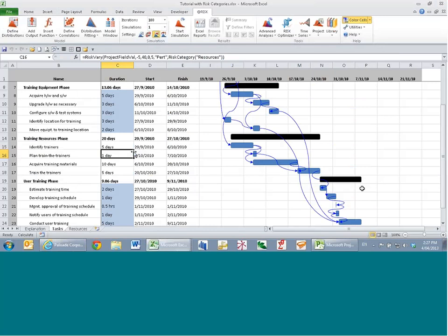And cancel that. So I've now included all of these tasks in one click, essentially. So I could build large groups of durations, say durational uncertainty, which is the most common type, in terms of risk category. So you might have low risks, moderate risks, high risks, extreme risks. You might also have a column where you actually have a text field marked with a particular type of risk.